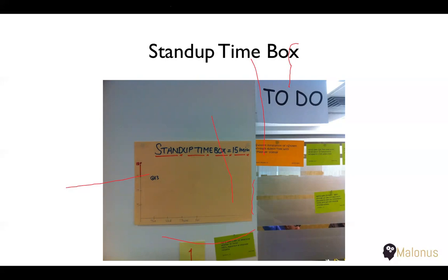at least during the initial sprints, because in the initial sprints there may be a lot of points to be discussed, and people want to know a lot of information, and that's where people spend a lot of time. But definitely, as you move towards the later sprints, that time should decrease. That is the first point. And definitely, if there are discussion points, they should be taken out of the stand-up, instead of having a discussion with everybody, which really wastes a lot of time for everybody in the team.